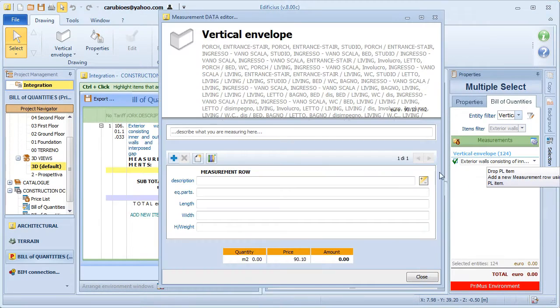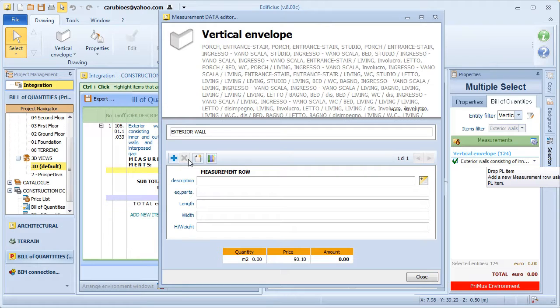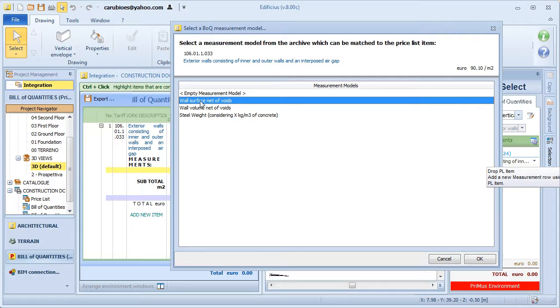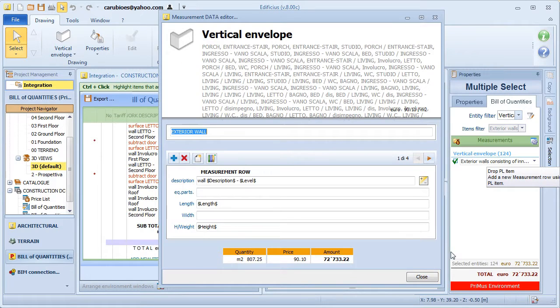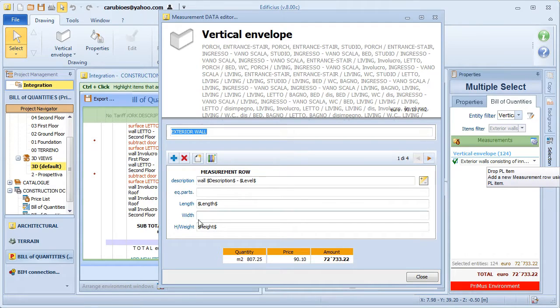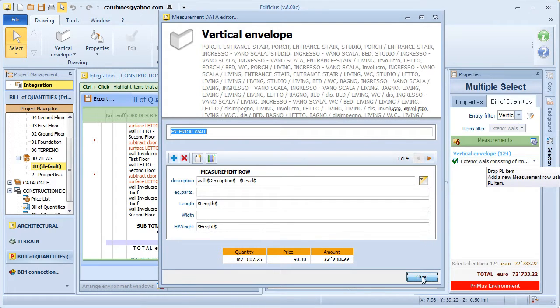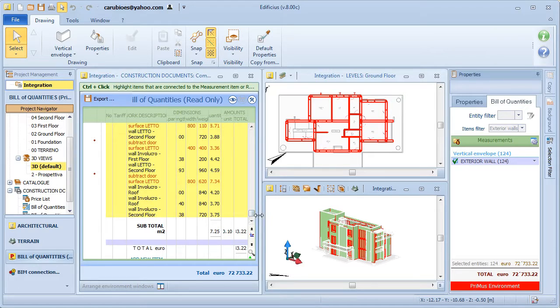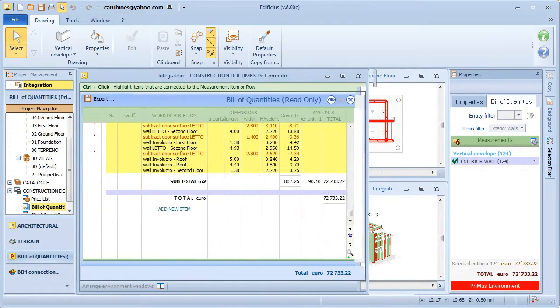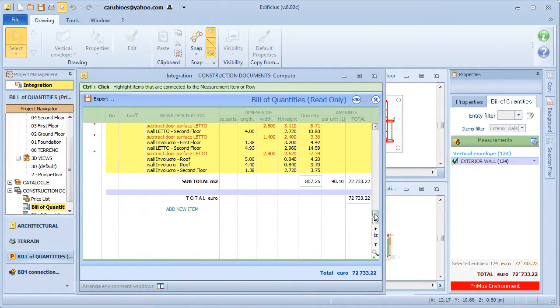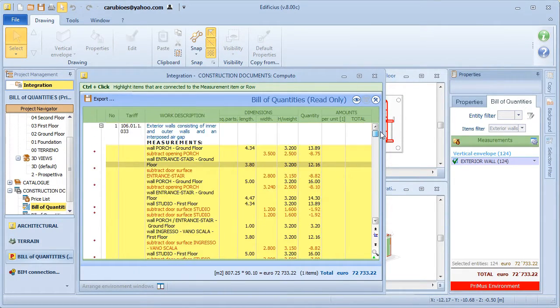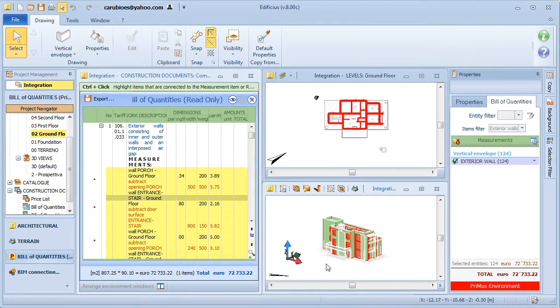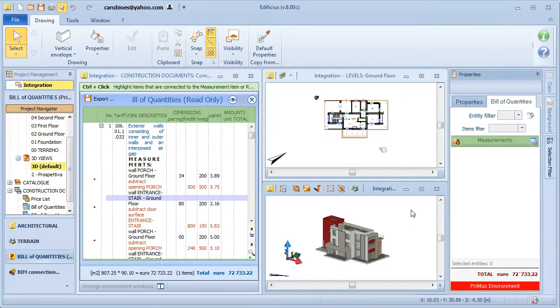With this first association between a cost item and a BIM entity, the program then proposes a series of measurement models. These are of course very useful for speeding up the quantity surveying phase with predefined variables for each kind of entity. In this case, you want to use a model to measure up the wall surfaces considering net of openings. As you can see in the measurements editor, we have all of the measurement details automatically inserted.